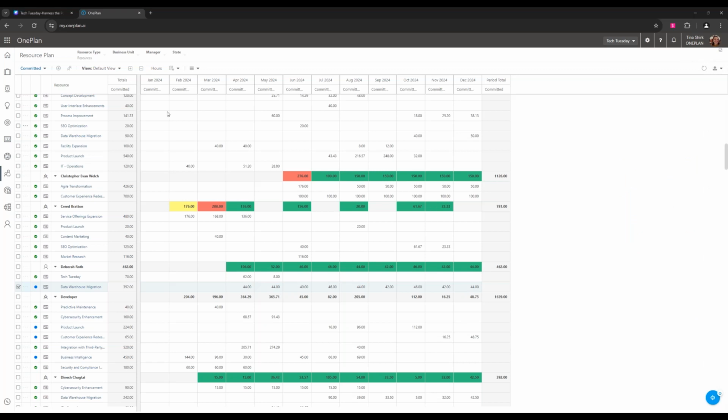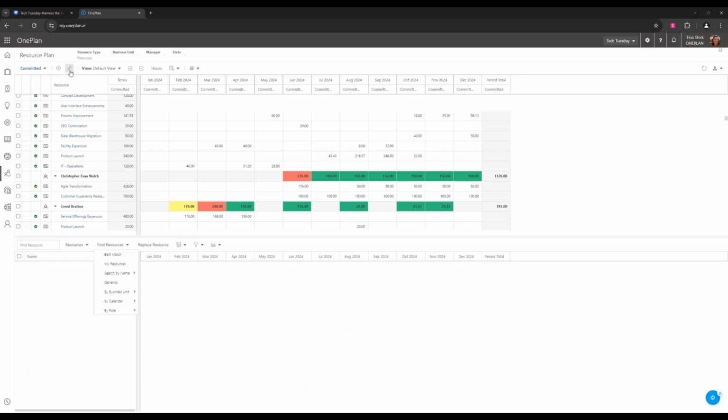All right, so now that we have a booking, let's keep rolling down the line here. Next up, we have the candidates list, which Deb showed you briefly. Sometimes you need to start planning before you know who has availability and will be assigned to do the work. The great thing about using the OnePlan Global Resource Planner is that you can use generic resources for long-range resource forecasting. Then you can match those generics with named resources using the candidates list.